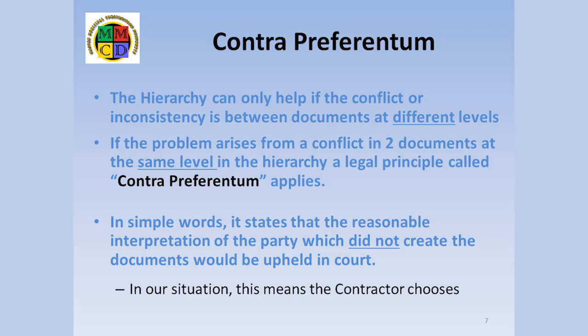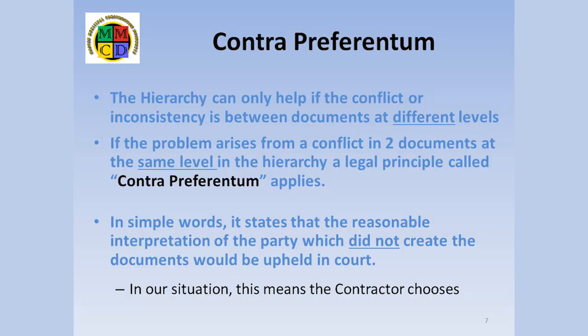It is not possible for an owner to contract out of the contra preferentum principle — that is, to simply state that the contra preferentum principle does not apply. However, owners can insert a supplementary general condition which states something like: if a conflict occurs, the contractor is to follow the instructions for the more expensive option. This will clarify the situation for all involved, but it can open the door to additional costs which, being unaware of the conflict, the owner might not anticipate or wish.